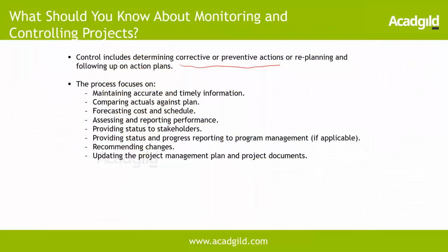plans. So once we take a preventive or corrective action, it means we are going to alter the path of the work, right? The way we are going to execute, we are just going to alter it a little bit. So for me to alter, I will have to update the project management plan or any other key documents. So here we have to replan again.